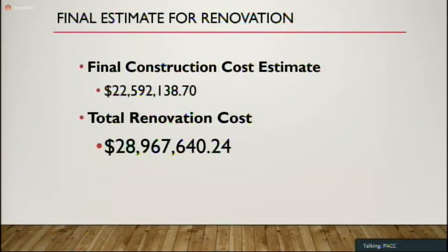And in fact, they are seeing an acceleration of around 30% in construction prices in 2021. So they advised us that the cost estimate that was prepared last April needed to be adjusted upward by approximately 30%, excuse me, not 30 million. So the numbers that you're seeing on your screen would be the new cost estimates for the renovation of TCP.